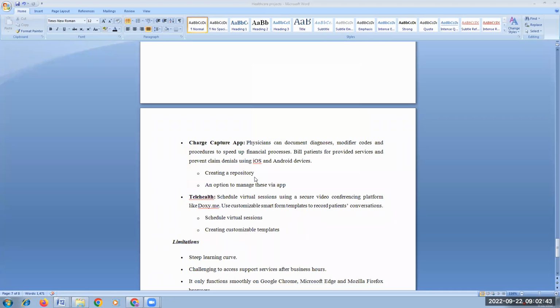Right. So next question, by Pratishtha Rai: as a BA, do you write user stories directly on Jira or do we have them prepared? Usually we write it in a Word document, do the modifications, then go to Jira. If it is new, first, we write down the documentation for a better understanding, rewrite the user story once or twice, give a clear picture, and then we go to Jira. That's how we do it.